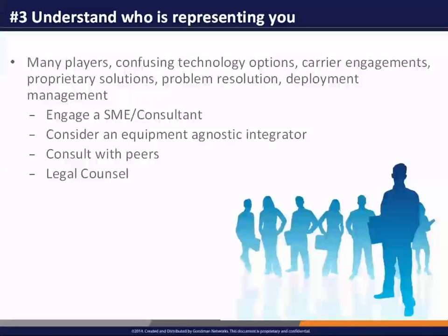And then finally understand that at some point, probably pretty soon in this, you're going to need some legal counsel. If you enter into an agreement with a neutral host or a carrier, typically contract length is up to 10 years, sometimes more. And so there's going to be a lot to consider and review in a contract involving a 10-year commitment. So be prepared to engage legal counsel on your team early to take a look at the agreements that you're going to see from the carriers and the entities involved in the DAS deployment.